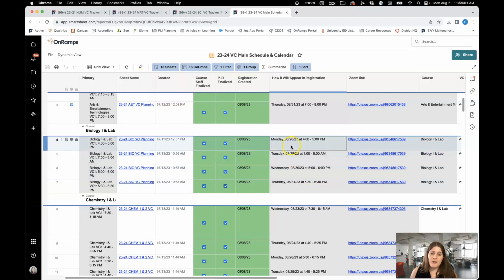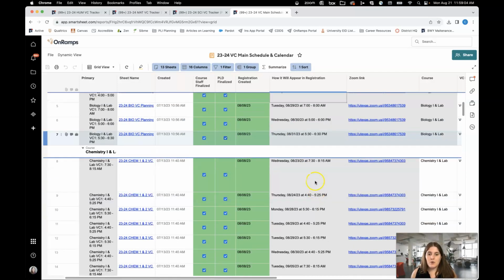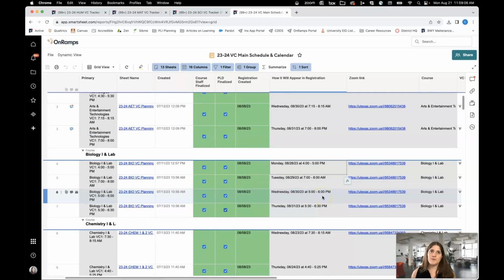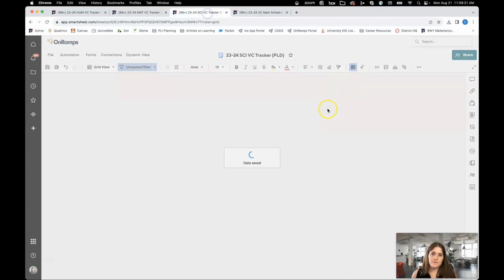So for the midpoint reminder, generally we're looking for a date that's in the middle toward the beginning middle. So when we're looking at 4 days, I'm going to put that on the second day rather than the third day, if that makes sense. So whenever you can't divide it exactly in the middle, always lean toward the beginning half. So we're going to put this midpoint reminder on Tuesday, August 29th.